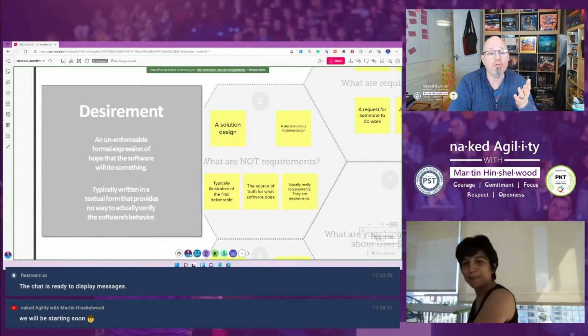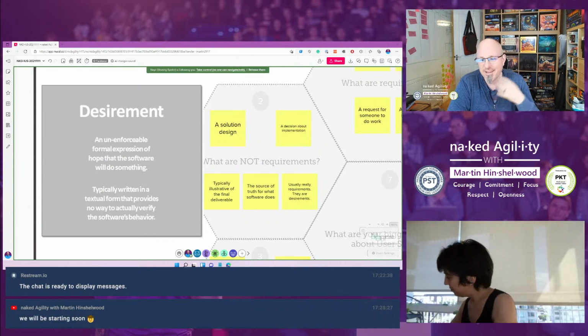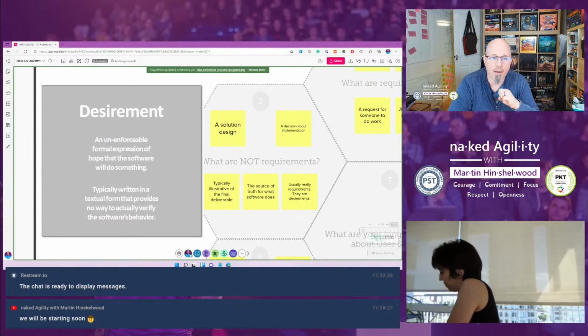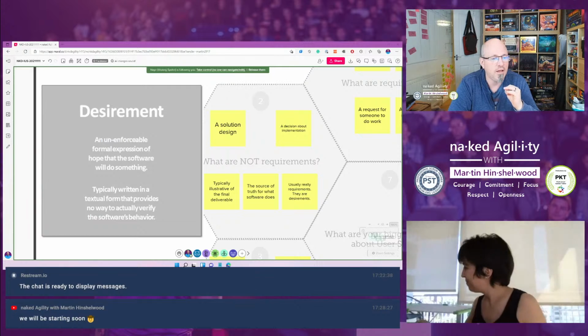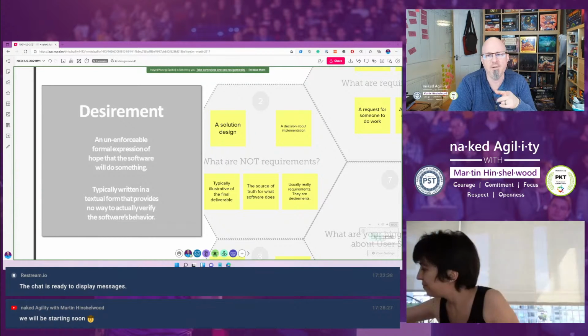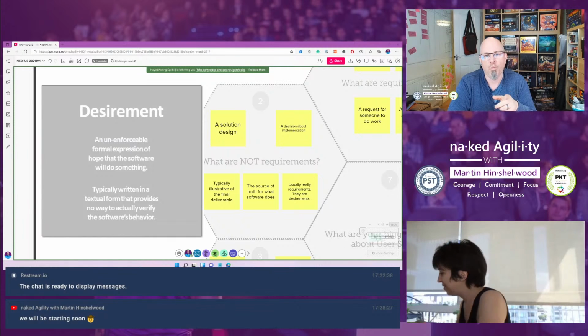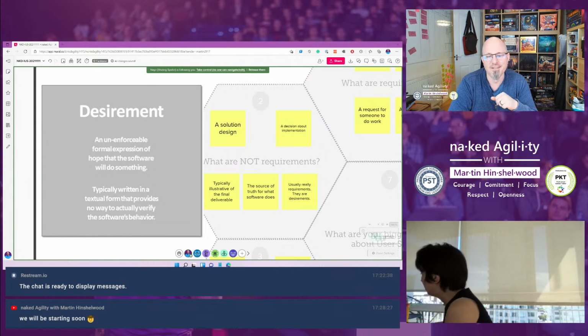But lots of people use the numbers later for their velocity and various things. That's cool. I prefer the Kanban metrics, but I do work with teams that use velocity. Just don't do what one of my teams did, which is sign a contract with the customer where velocity was specified in the contract and they had to be within 15% of their expected.